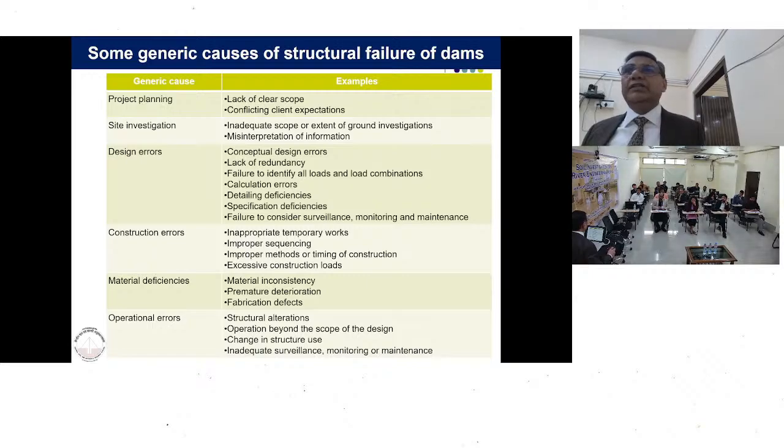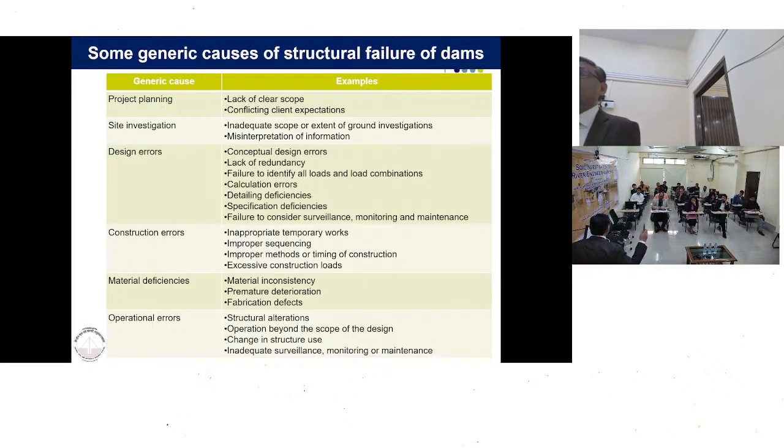Sir, nowadays it is total station and we simply took this. What were the levels at which you had taken these level points? At what distances? What difference of levels? Sir, we had taken 100-meter levels, and so it was simply developed. Then we took the surveyor again to that point.